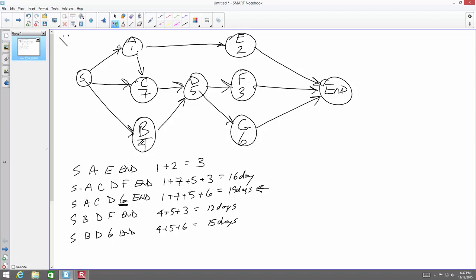Oh, really? So a lot of times, and there are advantages there, because if I design it as a design engineer, I may not know the capability of the contractor that's going to win the work. But if the contractor's in play and we work as a team, then I can design it for the equipment he has, or for the technology he likes, or for the methodologies he likes to build with. So there can be some synergies there to make that work. And typically, most owners see cost savings because of that, which is good, because everybody's about saving dollars.